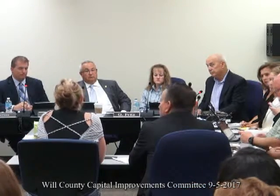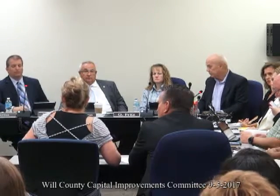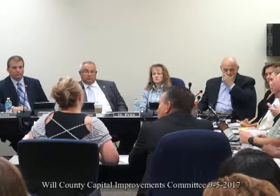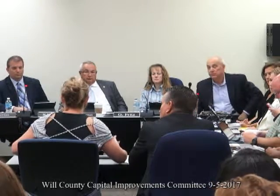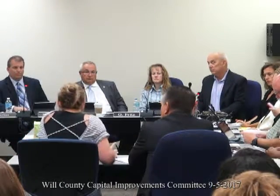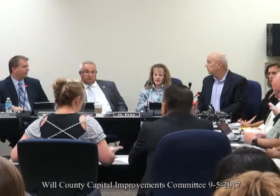Right. I think I can clarify this a little bit more. If you guys recall, DLR a few months ago was contracted to design the signage. It wasn't in their contract scope either. Everyone said, yes, let's go ahead and design the signage. Now this is us coming back, like they were awarded the contract to design the signage, being awarded an additional cost to complete the signage because it wasn't in the construction contract. Budget versus construction contract are two separate things. There could have been a pot of money outside the contract, it just wasn't in the Leopardo construction GMP because it wasn't decided at that time that you wanted to give us that work to complete. If that helps a little bit more.